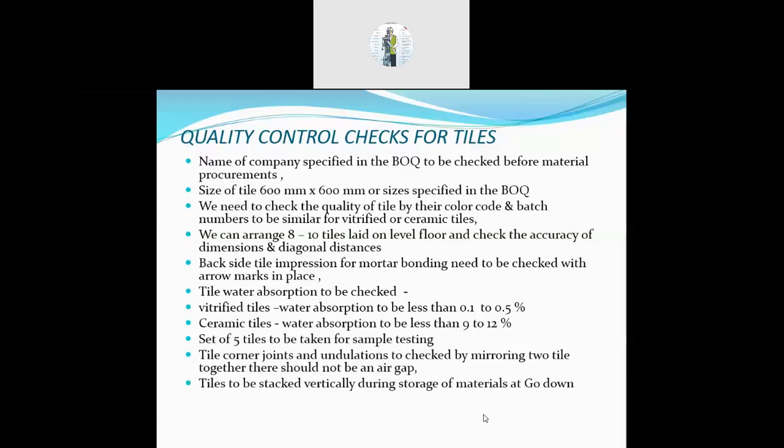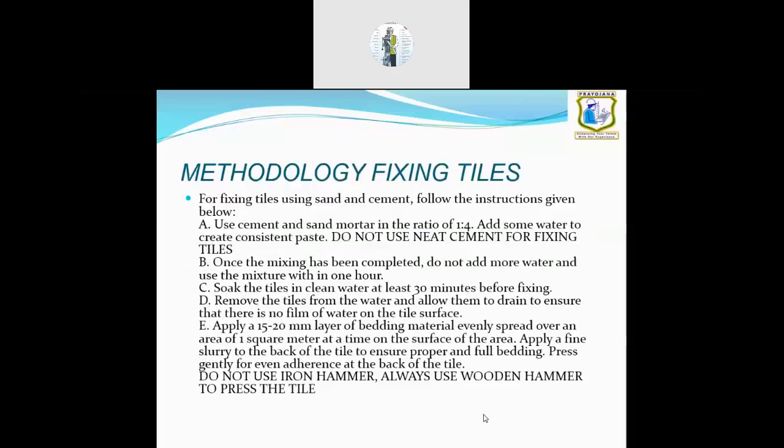Why should tiles not be stocked one over the other? Because of the thickness of the tile, it cannot hold more weight. It will have cracks, so there will be a lot of tile damage. So you have to stock it properly, vertically, in a slanting position of 15 or 20 degrees, and you can keep that above. Nothing will happen. Vertically it can sustain weight, but not on a horizontal surface. Okay, so this is the procedure to maintain the quality control and also the stock of tiles at the site.